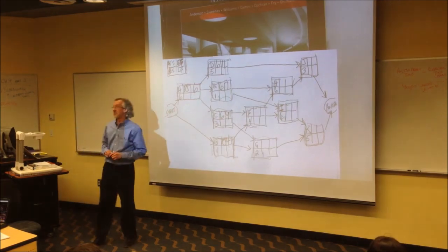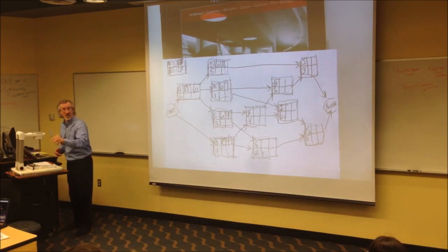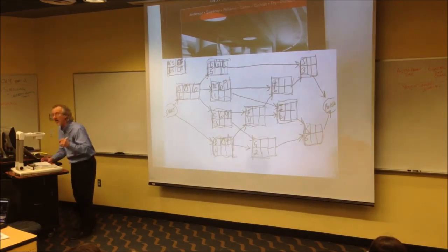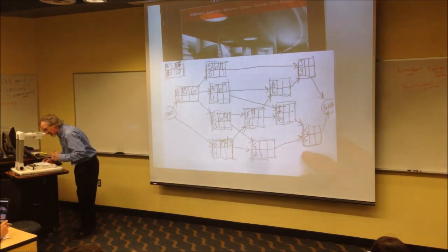Okay, we got 2 possibilities coming out of 2 of them. So it's either a 9 or a 4, and you're supposed to go with which number? The smallest or largest? That's right, forward pass, use the largest, 9 plus 4.